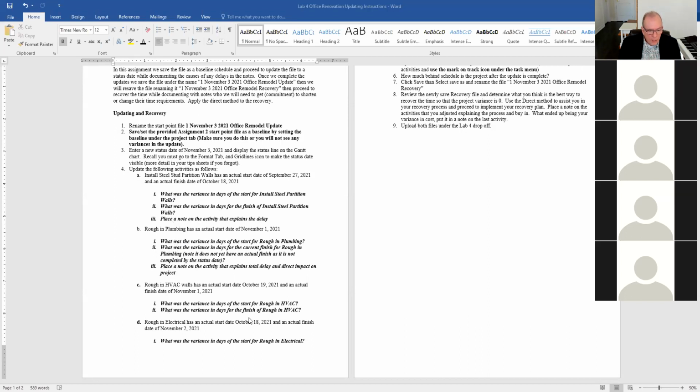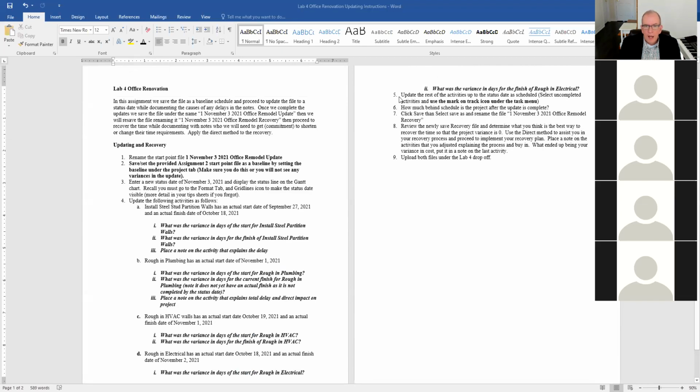Do the next for the plumbing and HVAC. For plumbing, I only get you to put a start date because it doesn't quite finish. It crosses the status date. For rough and electrical, put in the start and finish date. Then update the rest of the activities, marking on track. Now you evaluate how far behind schedule the project is. Click Save, select Save As, and rename the file recovery.